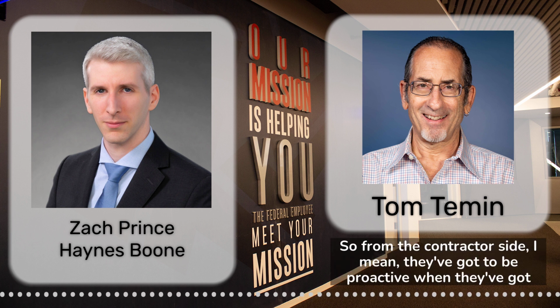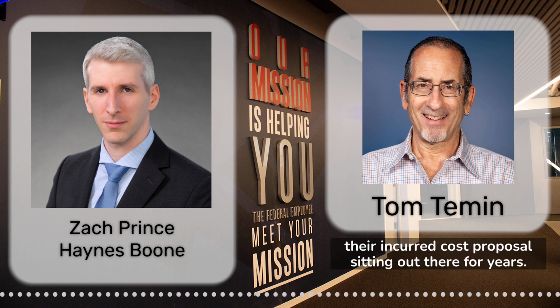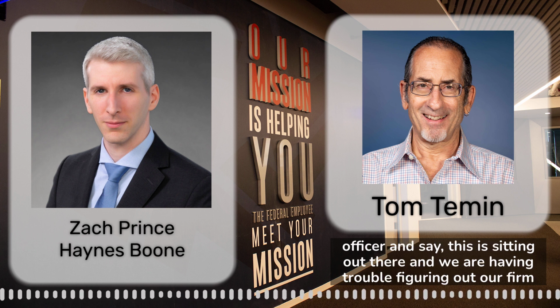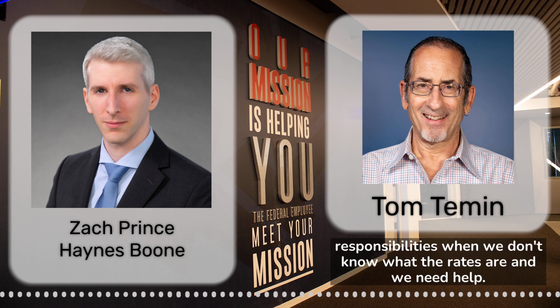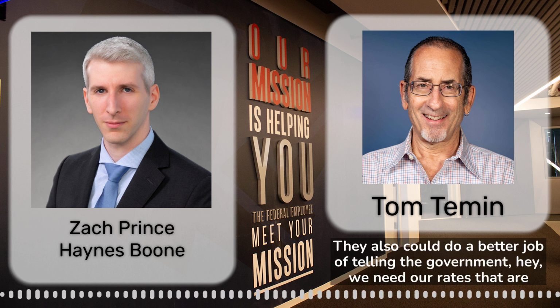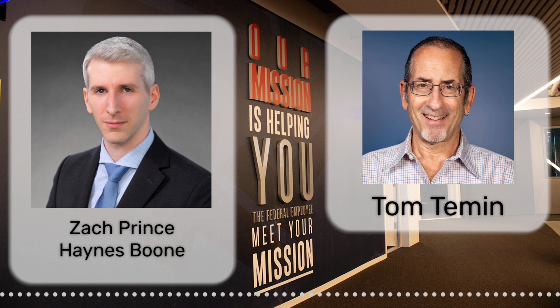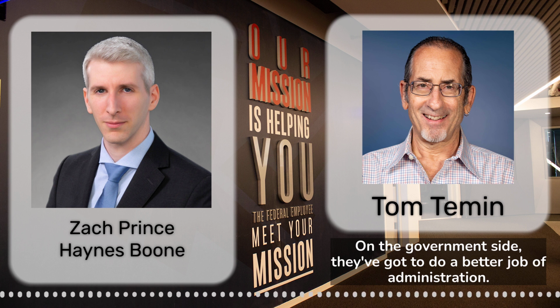do better? So from the contractor side, I mean, they've got to be proactive when they've got their incurred cost proposals sitting out there for years. Contact your contracting officer, do it regularly, or your administrative contracting officer, and say, this is sitting out there and we are having trouble figuring out our firm responsibilities when we don't know what the rates are, and we need help. They also could do a better job of telling the government, hey, we need our rates that are being used on a provisional basis for billing to reflect reality so that nobody is left holding the bag down the road. On the government side, they've got to do a better job of administration.